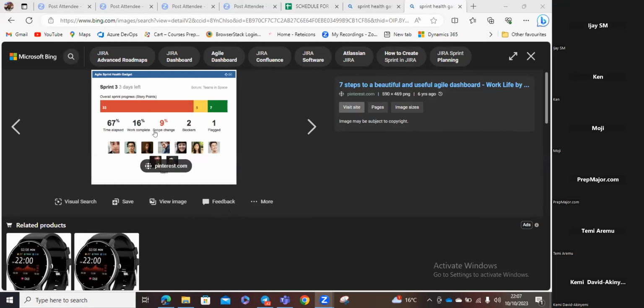Now, in scope creep, Scrum Masters, just be very careful. Don't let people bring in things. But the truth is, there's something we used to say as Scrum Masters. When they bring in things, when maybe a priority is changing or something, it's 2 ways. Never say no, never say yes. Always take it in, but don't take it into sprint. Just give them feedback that you will get back to them. Speak to your team. You check some things.